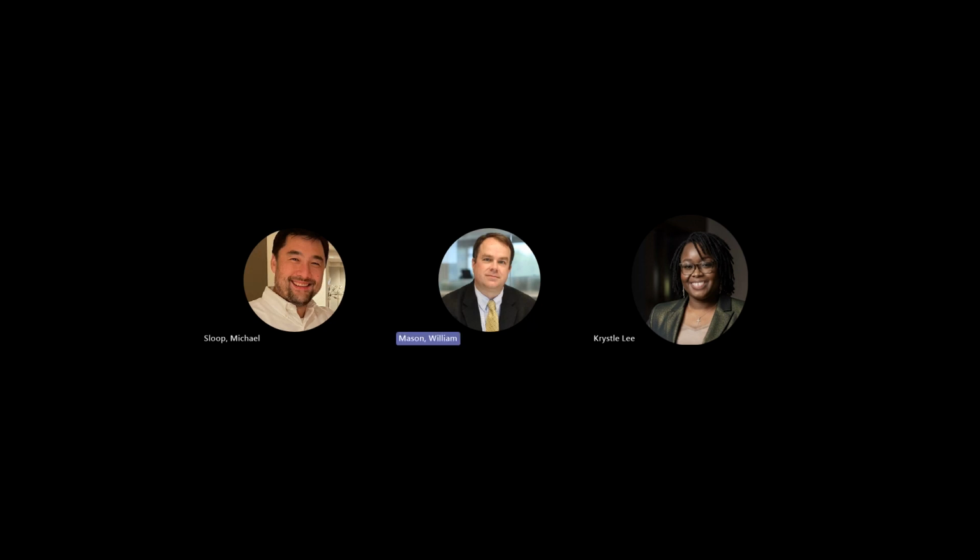Any other change items looming on the horizon? Oh, field order one. Oh, yeah, concrete repair at Joe Pete. I think our guys are looking for a repair procedure and product. I'll get that sent over to you guys today. Okay. I know Greg, Jackie and I talked about it, and what we had planned on doing was just a non-shrink grout and acrylic bonding agent, just a mix of that, 50/50 acrylic bonding agent and water, to patch what needs to be patched there.